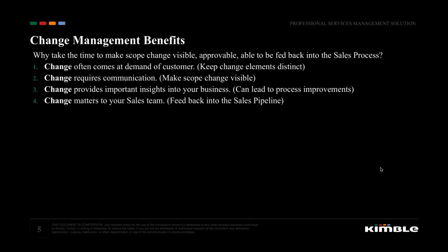And last but not least, change is not always a sure thing. It's possible to find yourself in a competitive situation where you are bidding for additional work as part of an in-flight project, or perhaps trying to win the approval of a project sponsor for additional budget. The Kimble Change Management capabilities allow for the creation of a possible or probable change element on a firm engagement. Whether you go on to win or lose the bid for extra work, Kimble is aware of the potential change for resourcing and revenue forecasting purposes.